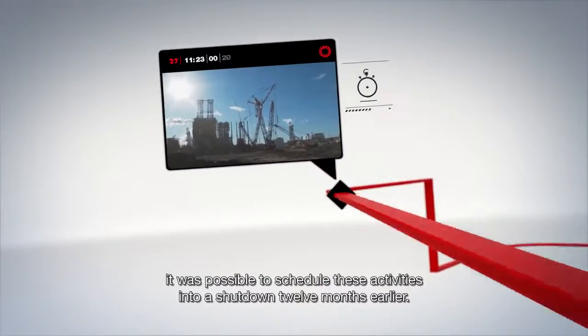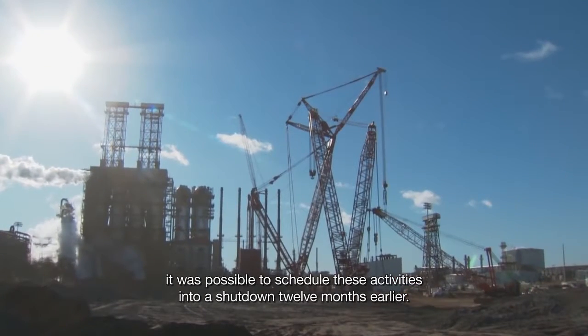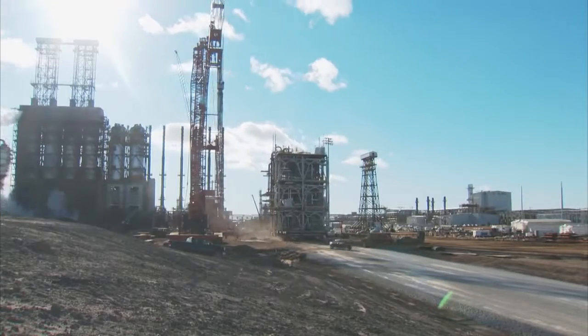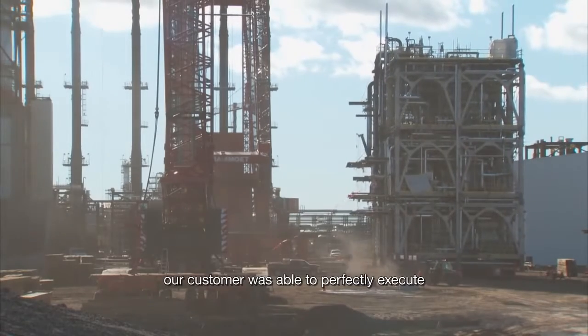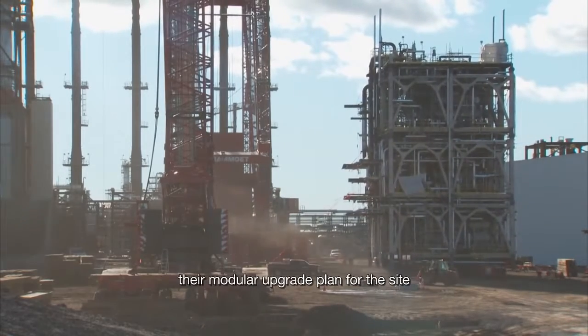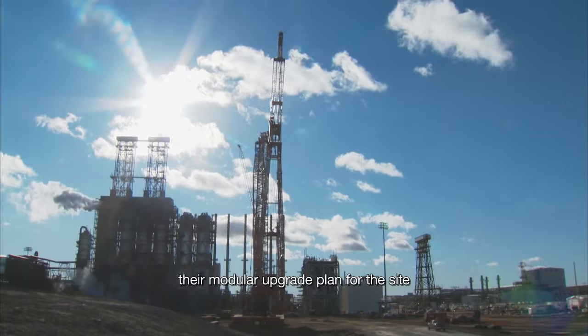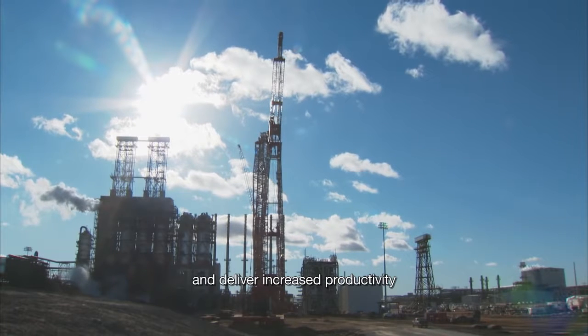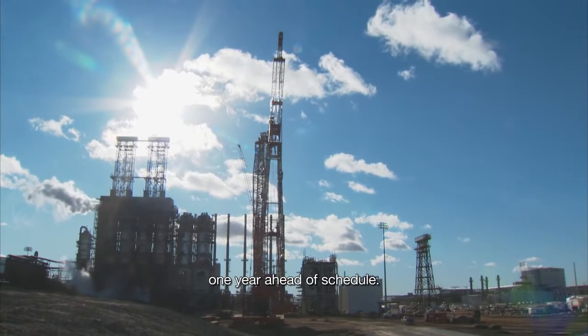it was possible to schedule these activities into a shutdown 12 months earlier. By entrusting Mammoet, our customer was able to perfectly execute their modular upgrade plan for the site and deliver increased productivity one year ahead of schedule.